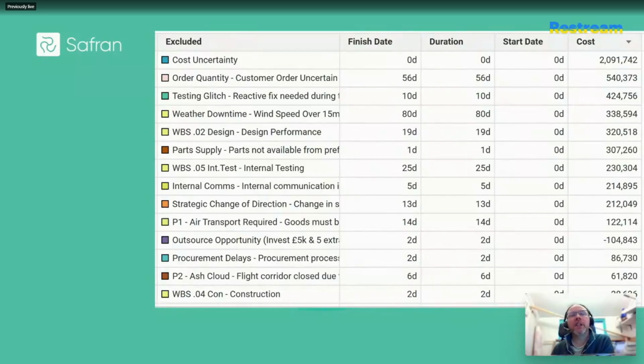Most significantly, you and the rest of your team can see the results in units of measure that are entirely relatable, days and dollars, without first having to educate people or remind people what a correlation coefficient actually is, because that's what we were dealing with back on the previous tornado charts. So to go back to my previous example, 100 risks, the original simulation, so that's 101 simulations in total so far, and that's going to go through the whole 16,000 activity critical path network, CPM, and reschedule it all those times.